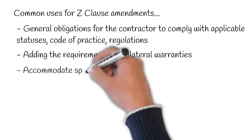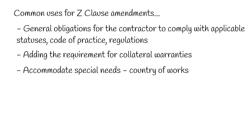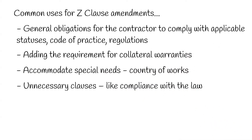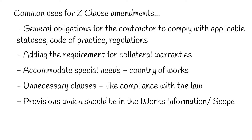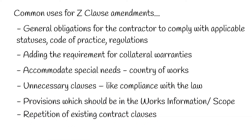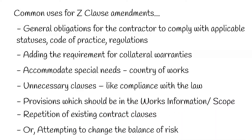3. Accommodate special needs such as those peculiar to the country in which the work is to be done. 4. Unnecessary clauses like compliance with the law. 5. Provisions which should have been in the work's information or scope. 6. Repetition of existing contract clauses. 7. Attempting to change the balance of risk.